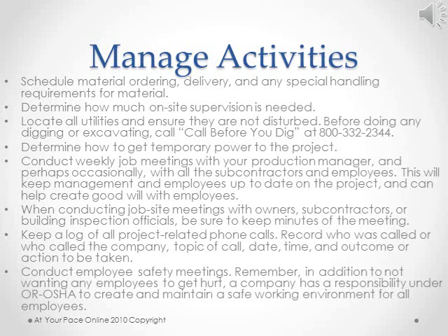While controlling the schedule and budget, these tasks need to be kept in mind. Schedule material ordering, delivery, and any special handling requirements for material. Determine how much on-site supervision is needed. Locate all utilities and ensure they are not disturbed. Before doing any digging or excavating, call, in quotes, "Call Before You Dig" at the 800 number. Determine how to get temporary power to the project.